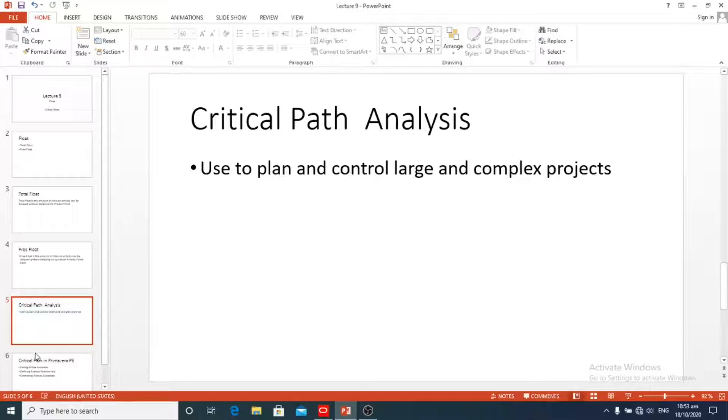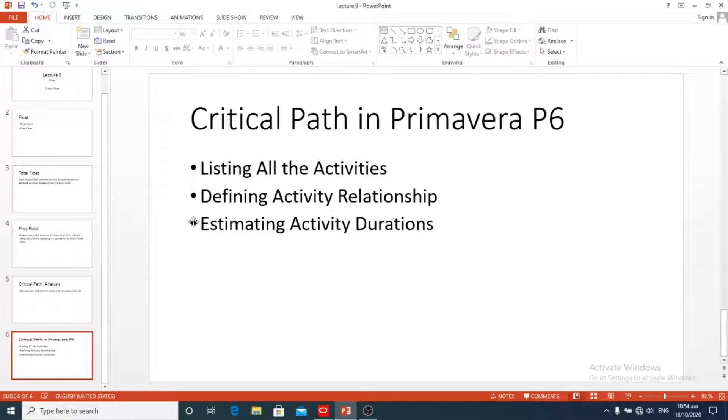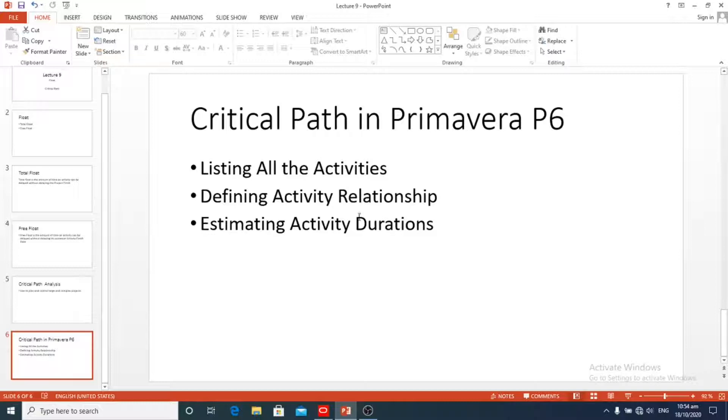How to calculate critical path in Primavera P6? In project scheduling, critical path analysis creates a model to represent project execution. Below are the basic steps of the critical path analysis: listing all the activities, defining activity relationships, and estimating activity durations.